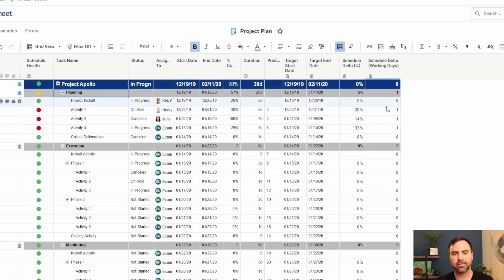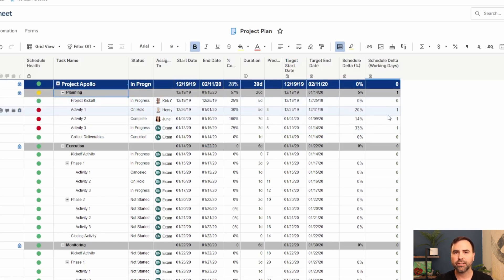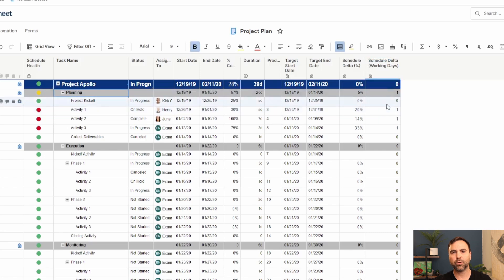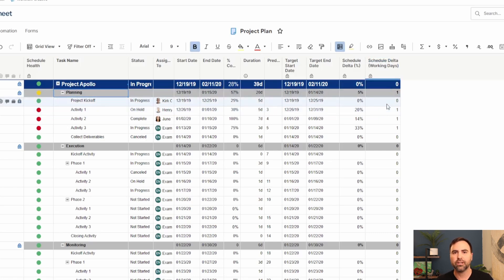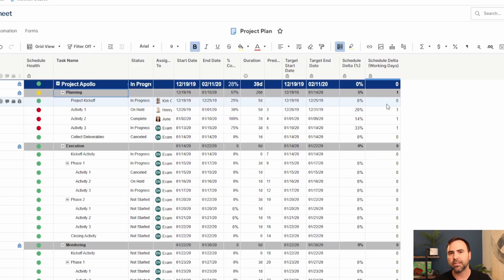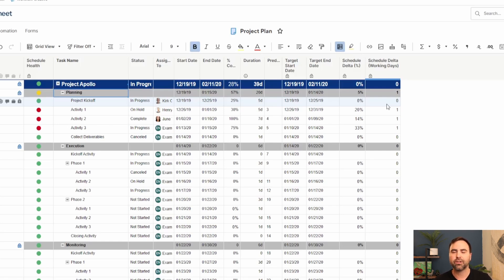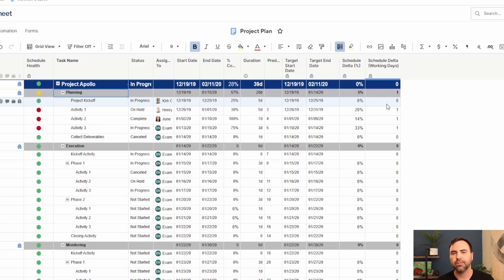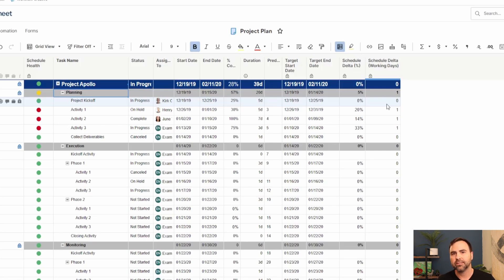We have some other data over here to the right. Another thing that we can use is baselines in Smartsheet. When I initially set up a project and I think it's going to run from January to August, that's my plan. I can set my baseline dates. Baselines will take a snapshot of all of my start and end dates for my project and store them in a totally different column. Then as I'm moving along throughout my project and my start and end dates are sliding one way or the other, Smartsheet automatically calculates for me the variance between what I said my project was going to go against, my initial timeline and what my actual timeline is.